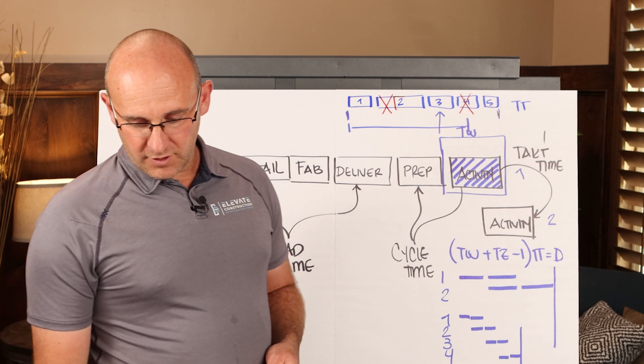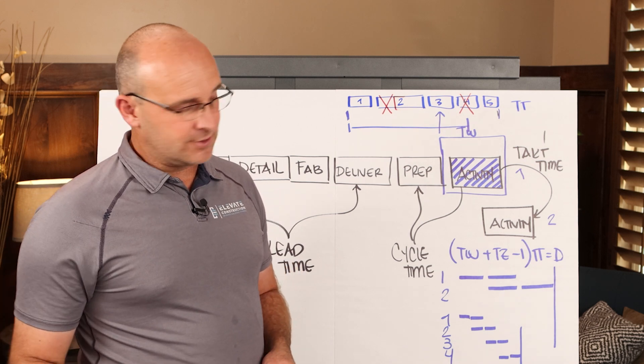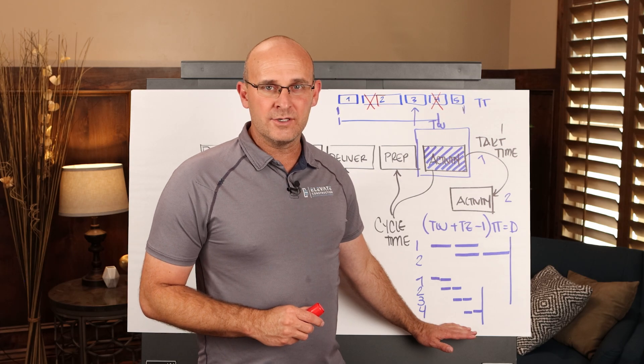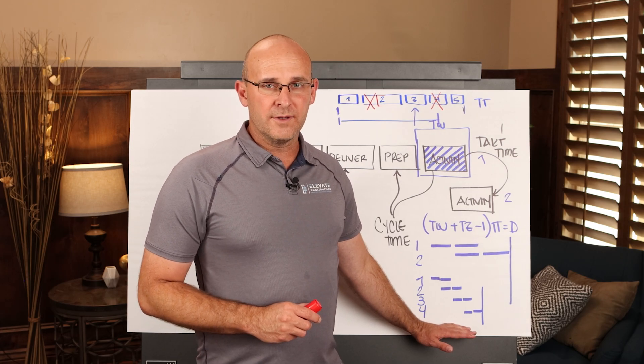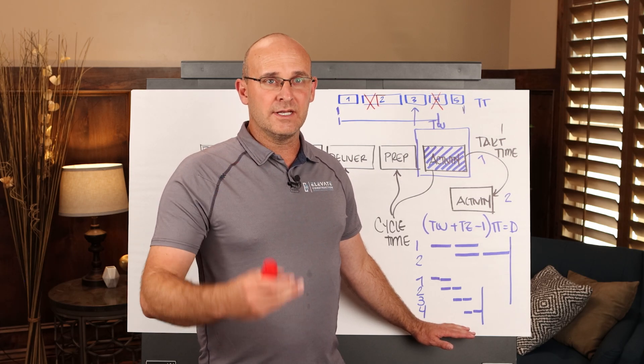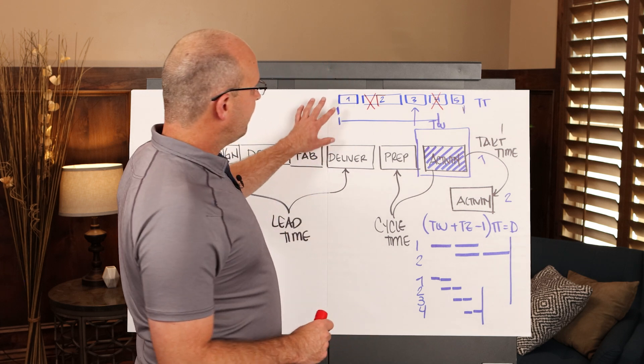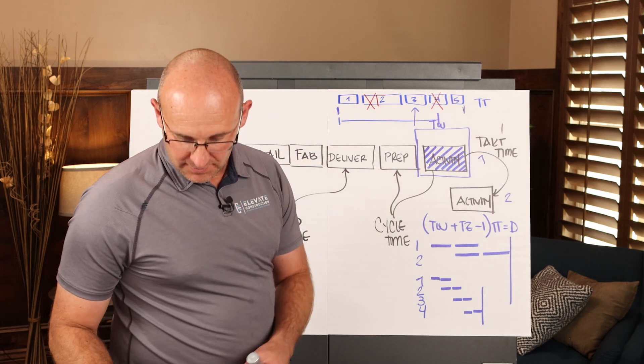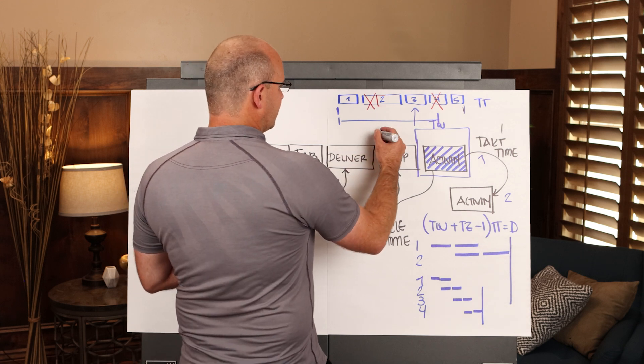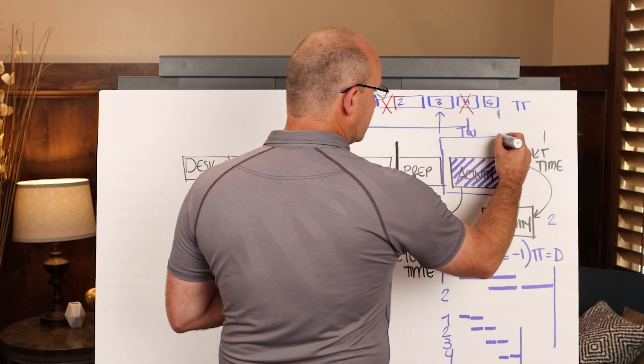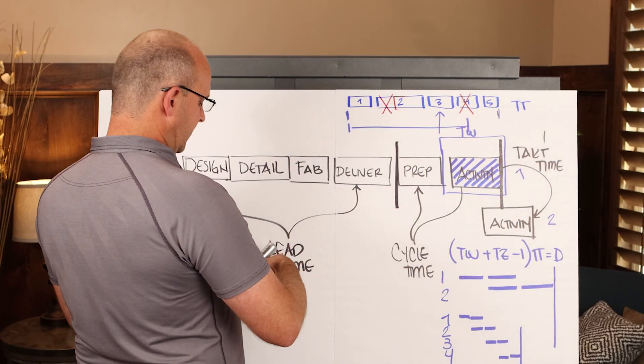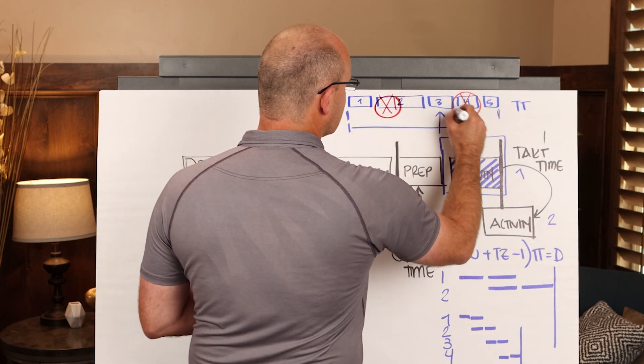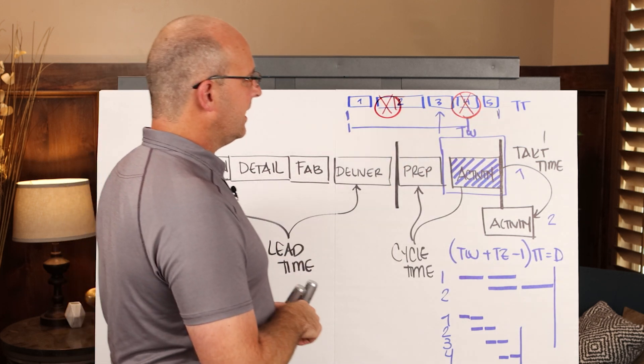So the overall project team to pull these two concepts together should be looking at tact time and evaluating how we should zone the overall building and actually complete on a tacted rhythm. And then foreman should be looking at not just the activity time, but actually the duration from the time it starts to the time it finishes and looking for those non-value added activities, shortening the cycle times and getting better at everything we do.